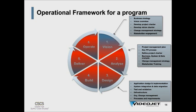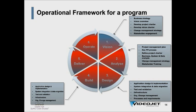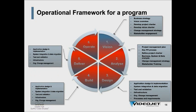The fourth phase is where you build the solution based on your well-defined user requirements. You do the testing and validation of the individual equipment, and start looking at how you will integrate your systems from an IT point of view. And the fifth phase is really where you start building the final solution, do your OQ and PQ, and go live at the end of the project.